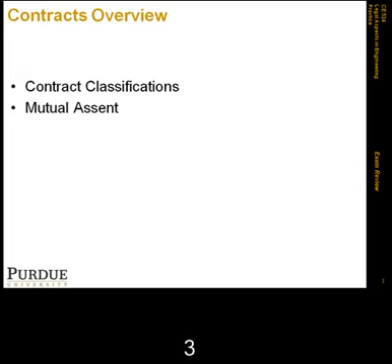Those agreements to agree are sometimes enforceable, and sometimes modern courts would enforce them by having the parties start talking about them again. Similarly, we also had agreements to negotiate in good faith, and again there's a tendency to enforce those, by requiring the parties to negotiate in good faith.